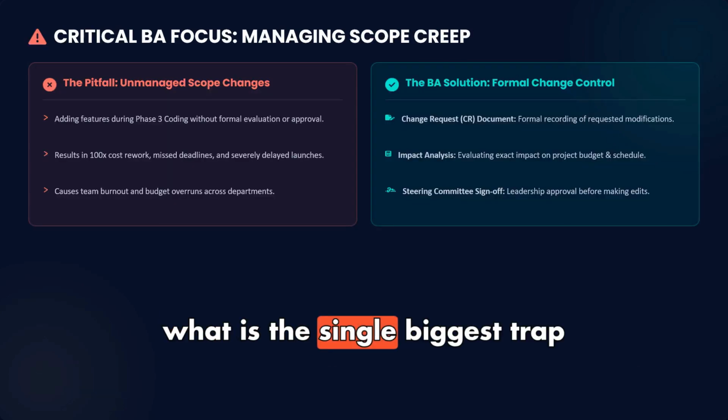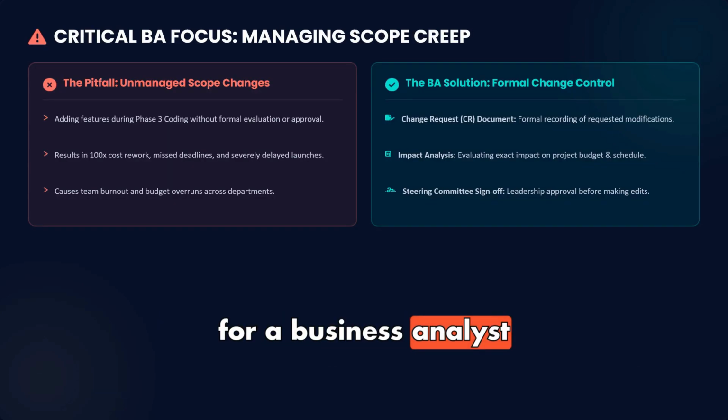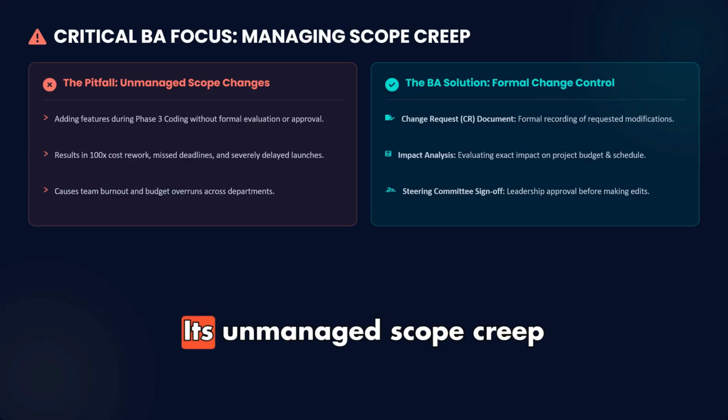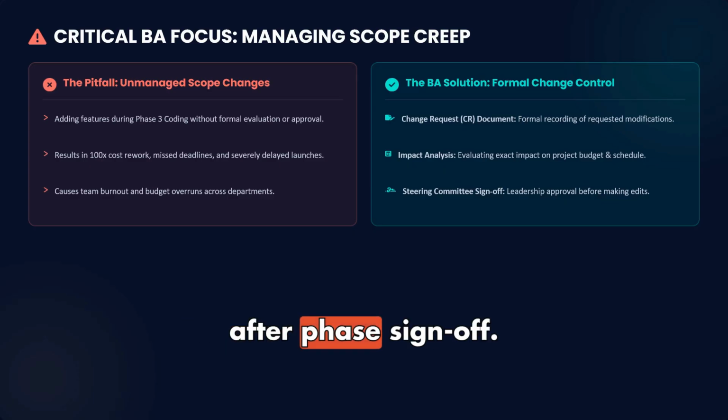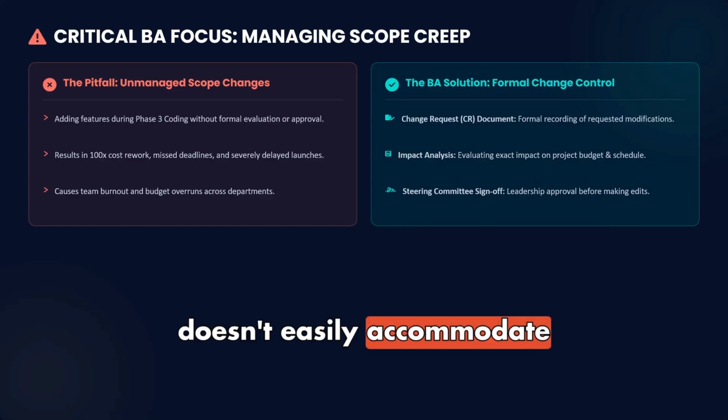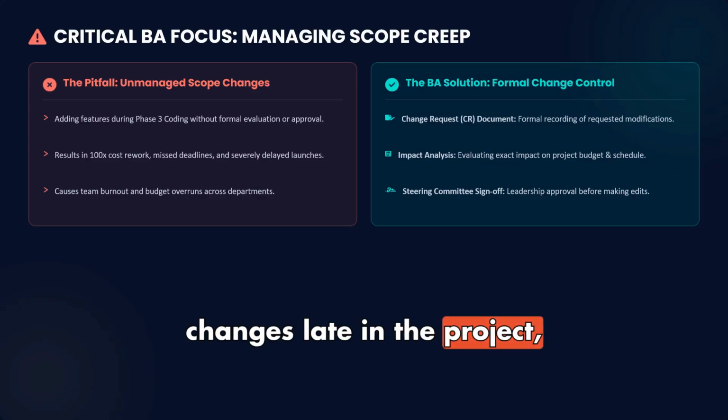Now, what is the single biggest trap for a business analyst in a waterfall project? It's unmanaged scope creep after phase sign-off, because waterfall doesn't easily accommodate changes late in the project.